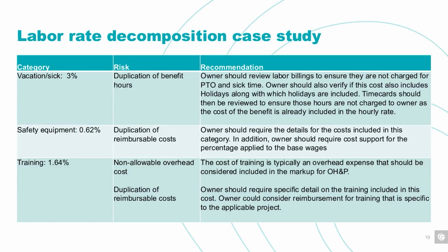All right, moving through again, we've got vacation and sick time of 3% of the base wage. So again, what we're concerned about here is duplication of benefit hours. Again, we want to see the breakdown. We want to understand what the vacation policy is. We want to understand what holidays are included in this. We want to see what their policy is for sick time. And then on top of that, right, if we're including the cost of these benefits within the labor billing rate itself, as we audit the project, we would expect that we wouldn't see charges for those individual hours.